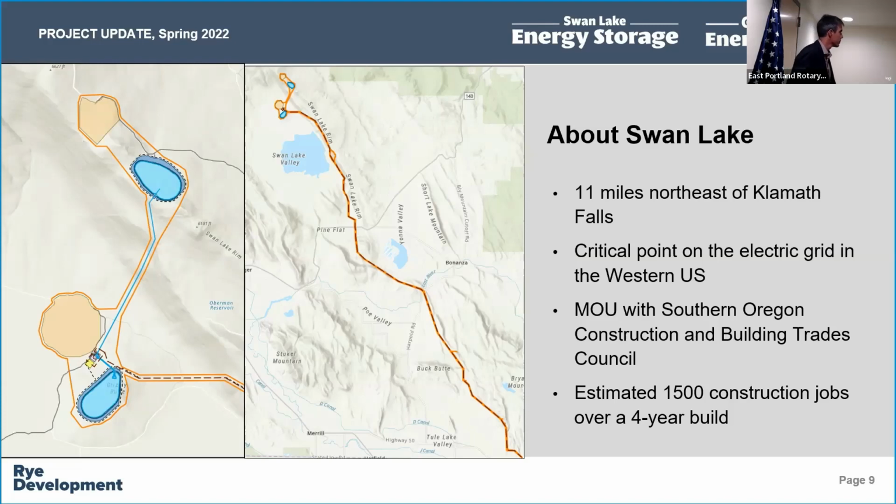in Klamath Falls went through a nearly decade-long permitting process. And part of that was to get the Department of Oregon Water Resources to endorse the use of existing groundwater wells in a way that could be determined sustainable over a 100-year period of time. One of the benefits of these types of projects is that, unlike batteries where you have to throw them out every 15 years and ratepayers like us are on the hook for replacing those, these are like our legacy hydro. Once you build it, it operates at a relatively low cost for 100 to 200 years, right?